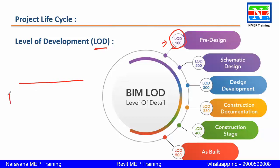In LOD 100, for example, we will give only one line. If we are using some pump, we will not put the actual pump — we will put it as a block, just as a basic tentative indication. It is not detailed; it is initial. When we proceed further to LOD 300 or 350, we will put the actual pumps with the actual size and all the details.